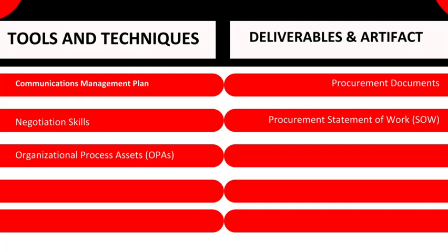The team leader uses this input to develop a procurement strategy. The procurement strategy includes the following steps. 1. Identify the specific goods or services that need to be procured. 2. Develop a statement of work, SOW, for each procurement. The SOW should describe the goods or services in detail. 3. Identify potential suppliers and get quotes. 4. Evaluate the quotes and select the best supplier. 5. Negotiate a contract with the selected supplier.